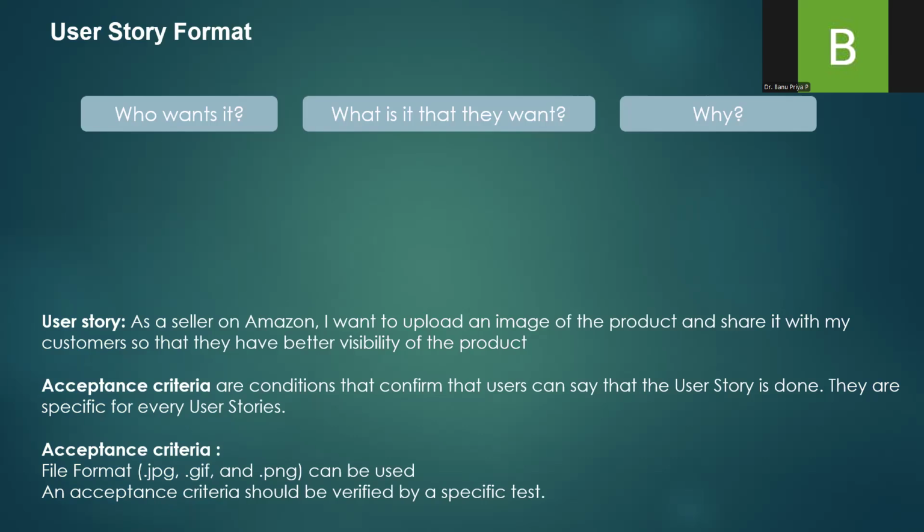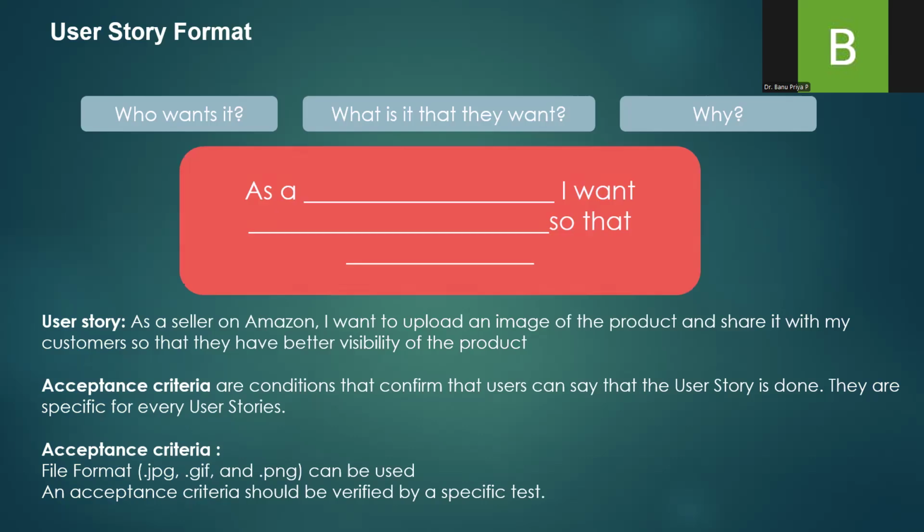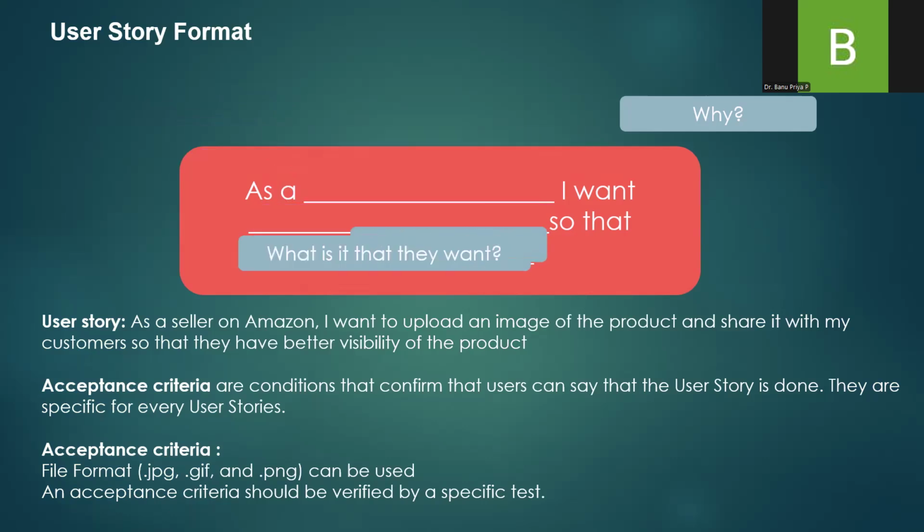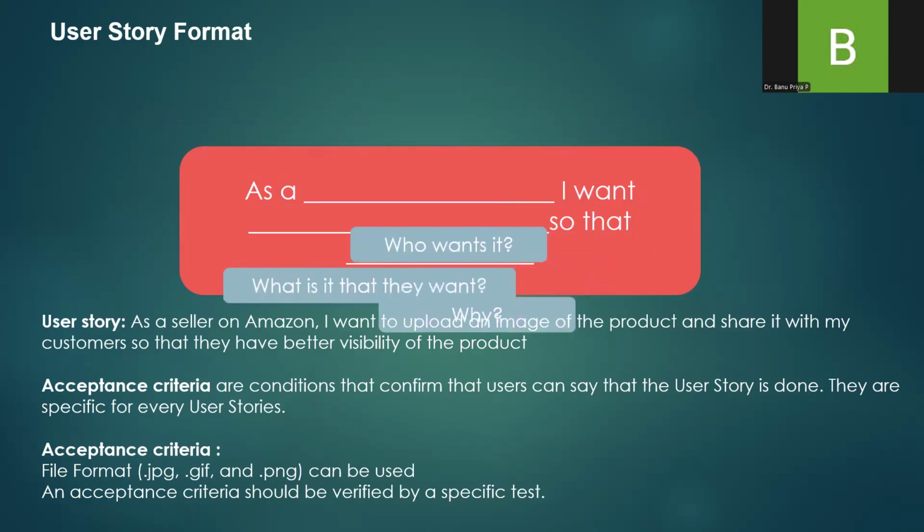So always a user story should answer who wants it, what is it that I want, and why I want it. That is why the format is as a, I want to, so that.